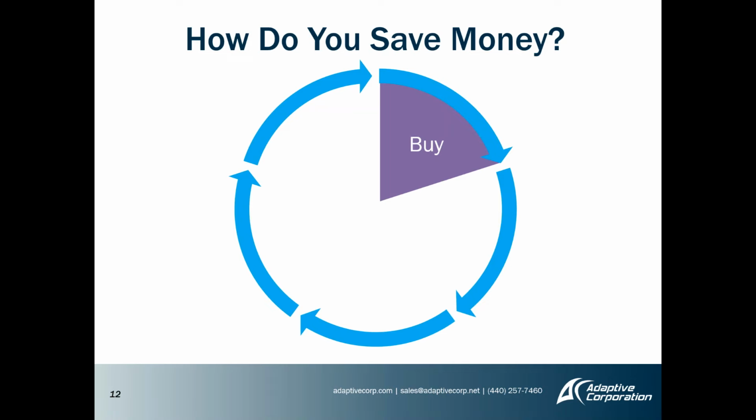Up first, order long lead items early. One of the first ways to save APQP-related hard dollars is to avoid spending too much in the first place. Too often, long lead items like raw material or maybe specialized but well-known subcomponents aren't identified and shared early enough in the process to allow them to be ordered at standard cost. And even when long lead items are identified early in the process, it's difficult to have visibility into common long lead items across projects for different customers.